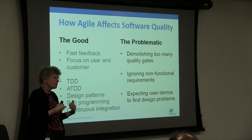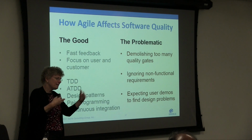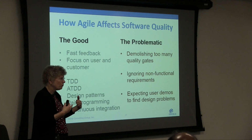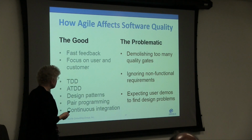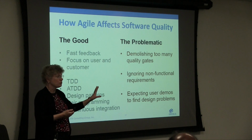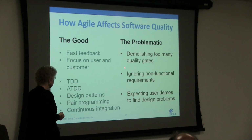Anytime you're not getting it to releasable, Agile is forcing you to think about why isn't it releasable, what have I not done, and how am I going to account for that in the work planning. Am I letting my whole group go ahead and start new features when these features are clearly not done because they're not at releasable quality? If you're simply putting things on the shelf, they are releasable quality, but you're just not going to release them yet, that's a different story because they are done. So understanding what done means.